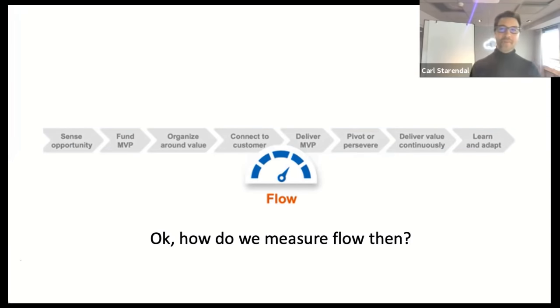And when we're talking about the flow, if you're an RTE, the most simple thing to focus on is the features. The joint slices of value, the increments, how you evolve the solution forward, from here's an identified opportunity, you've written a feature for it, it's no bigger than a PI, we think it's sort of understandable, let's start exploring this, until the point where we've done the work, we've delivered it, it's in the production environment, whatever that means, and it is actually producing value.